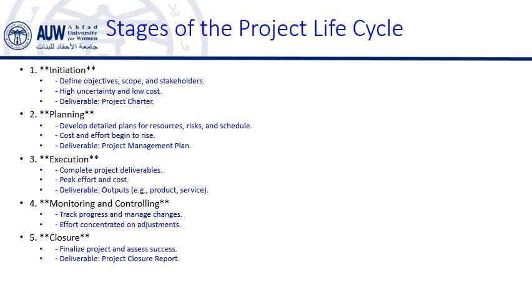And this will be our next topic, how we can select a project that aligns with the organization goal. The deliverable of this stage is the project charter, and this will be the first document that you will develop for your progress assessment, which includes the project's purpose, objectives, key stakeholders, and initial resource estimate.